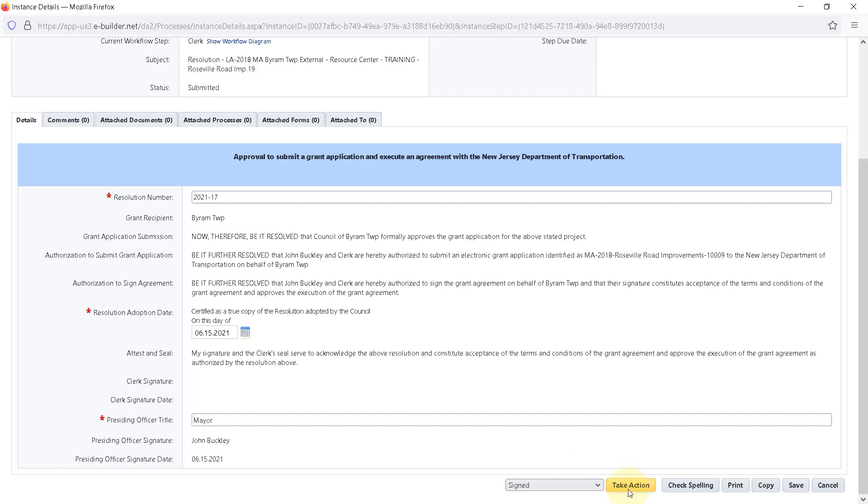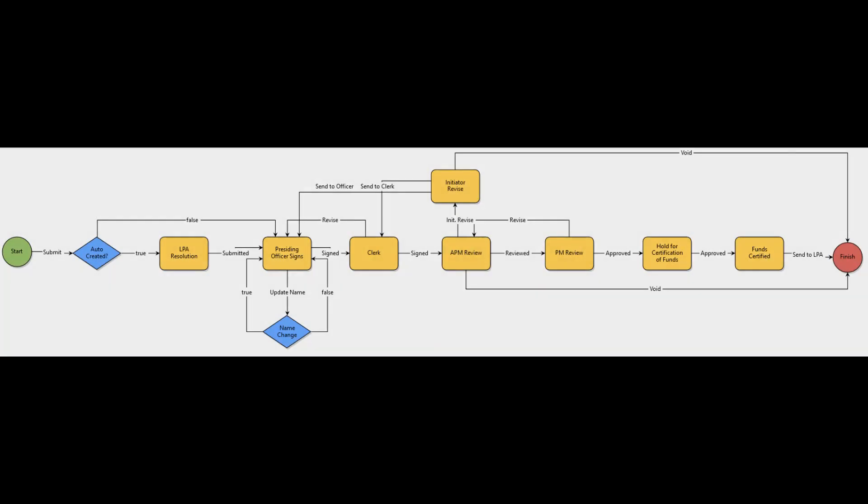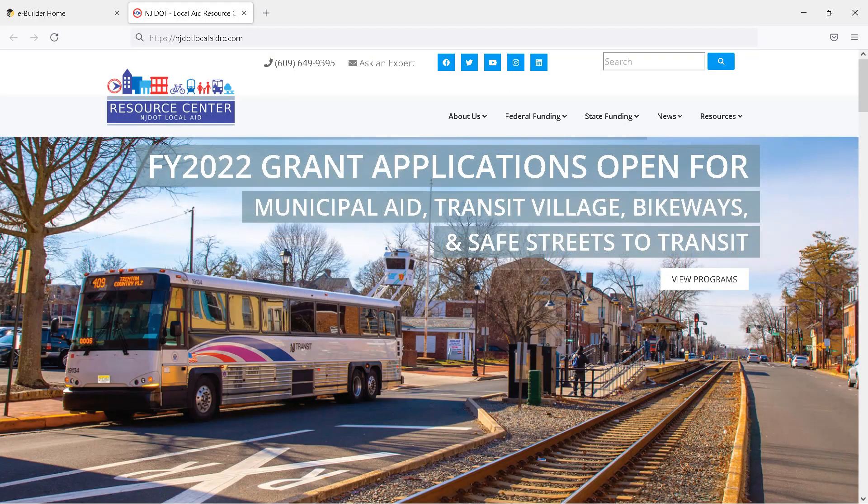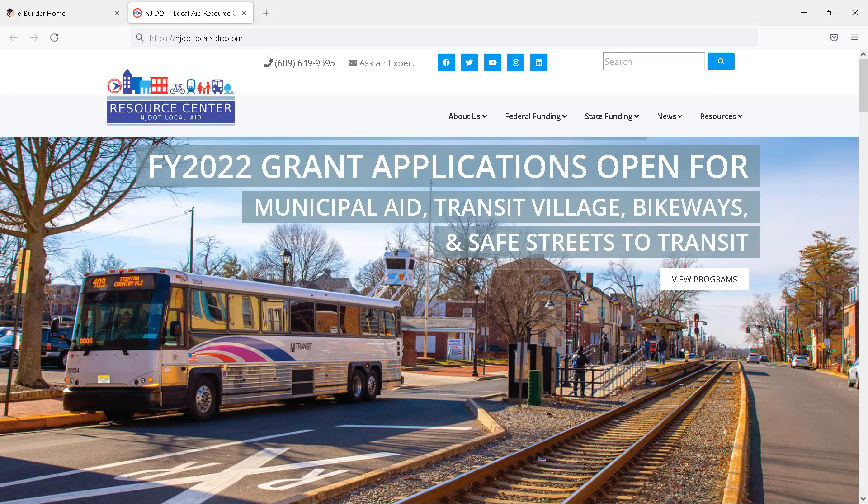Once the clerk selects Signed and clicks Take Action, the document will be electronically signed and dated and will advance to the NJDOT Local Aid Assistant Project Manager for review. The NJDOT Local Aid Assistant Project Manager or APM will then review the information and send it to the NJDOT Project Manager for review. This completes the steps to submit a resolution to the Division of Local Aid.